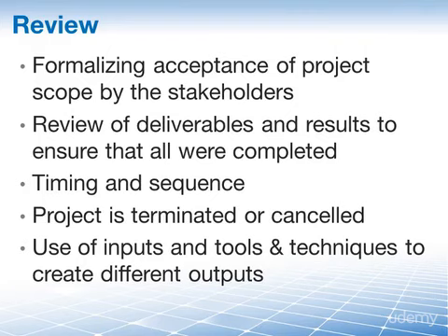In one hand, we hold the inputs that establish expectations for our deliverables. In the other hand, we hold the inputs that show us what was actually delivered. You inspect and use group decision-making techniques to determine acceptance or non-acceptance. This results in either accepted deliverables or change requests. Work performance information and project documents updates are also consequences of this process.